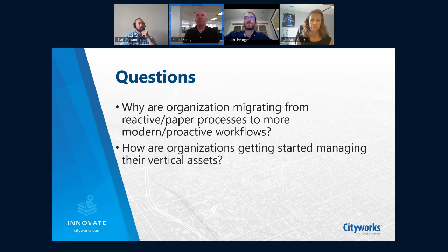Then we went over to the wastewater treatment plant and got several different small groups of mechanics to do the collection using Field Maps. There were a lot of lessons learned from that data collection effort, but it's gotten really good and efficient now. So it's live. They're doing PMs and repair work at our major treatment plant, and we have another treatment plant in the other part of the city that we're working on now. Are you seeing the same process, Jake?